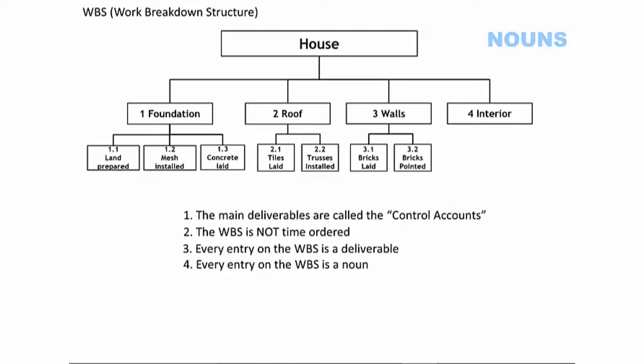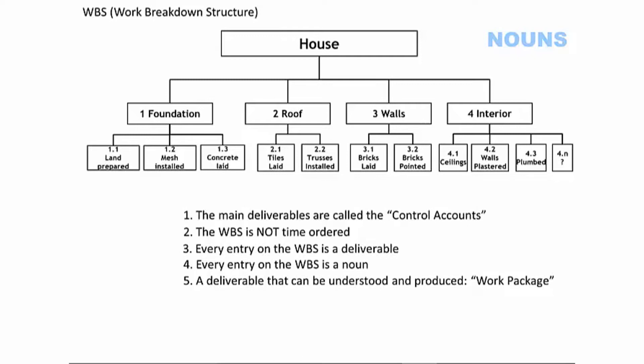Work packages are deliverables that are simple enough to be understood and produced. Item 1.2 — mesh installed — you cut steel mesh to fit the excavation and perhaps weld pieces together, so that is a work package. Item 1.3 — concrete laid — a truck pours concrete, it gets spread and smoothed, so that is also a work package. A work package does not get decomposed any further. But item 1.1 — land prepared — probably needs more decomposition.